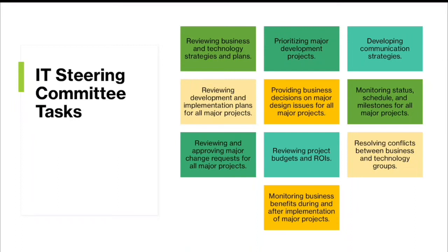Reviewing business and technology strategies and plans, prioritizing major development projects, developing communication strategies, reviewing development and implementation plans for all major projects, providing business decisions on major design issues for all projects, monitoring status, schedule, and milestones for all major projects, reviewing and approving major change requests for all major projects, reviewing project budgets and ROIs, resolving conflicts between business and technology groups, and monitoring business benefits during and after implementation of major projects.